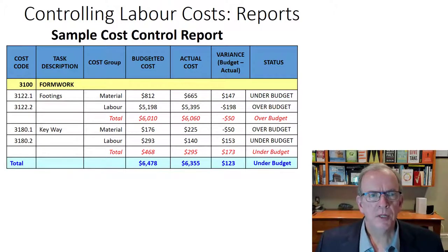So we mentioned in Lecture 2A that we would want to have a baseline budget. And of course the data, however it's formulated, we mentioned that there should be some sort of cost coding going on. We should have some breakdown of the work. We should have a grouping of the cost, material, labor, equipment, admin, whatever that may be, that we want to monitor different items on.